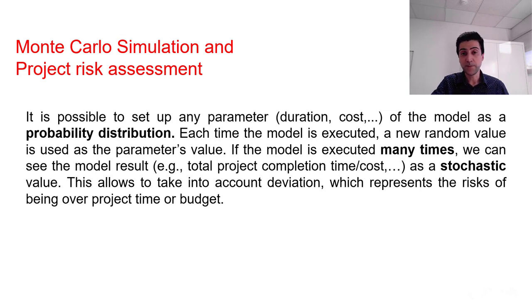We can use probability distributions for different input variables to our model and then generate random numbers and take samples from the statistical distribution as the representative of the population. And the more is the number of simulations, the more confidence we have in our results. It's important to understand that this is resulting in stochastic values. So such techniques are very useful in modeling uncertainty and especially for scenario analysis.